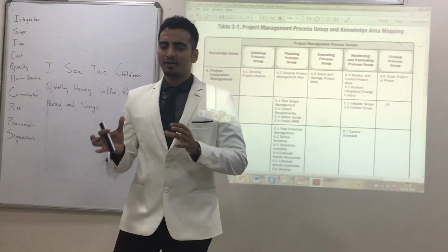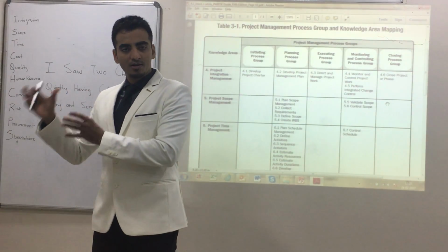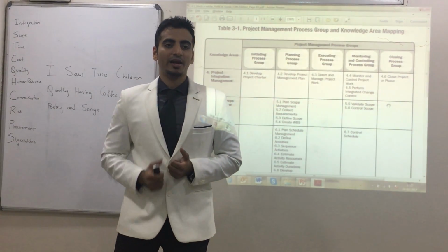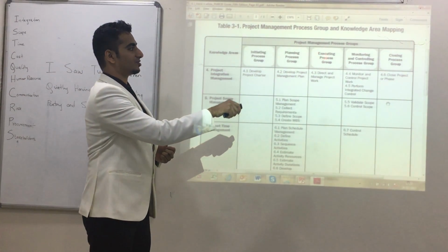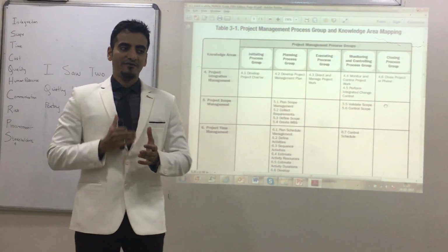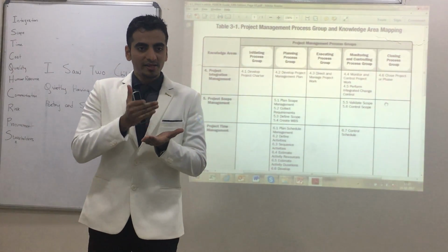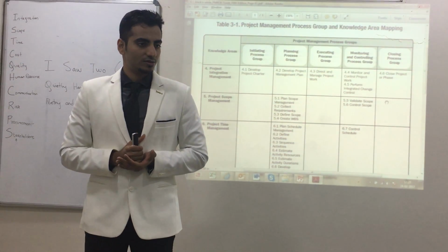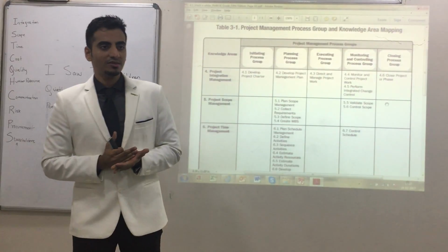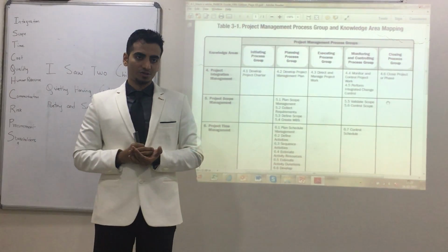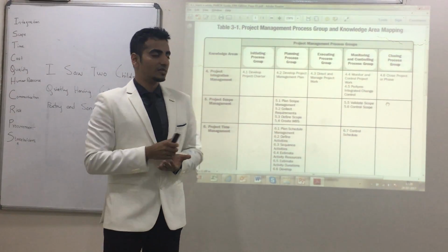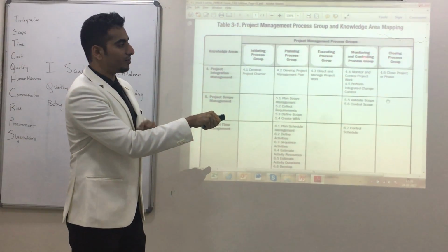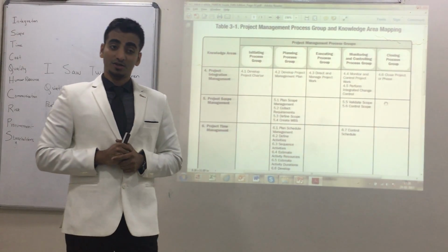Once we have already planned how our project will be done, how I am going to build the banking portal for Bank of America, somebody has to work on the ground, and where will that happen? That will happen in the execution stage. So once we have executed the project, at some milestone, I need to stop. I cannot just check the deliverable at the end of 12 months. So what will I do? After every 3 months, I am going to check certain deliverables of my project. And that deliverable or milestone, the point when I check this deliverable, is nothing but monitoring and control.